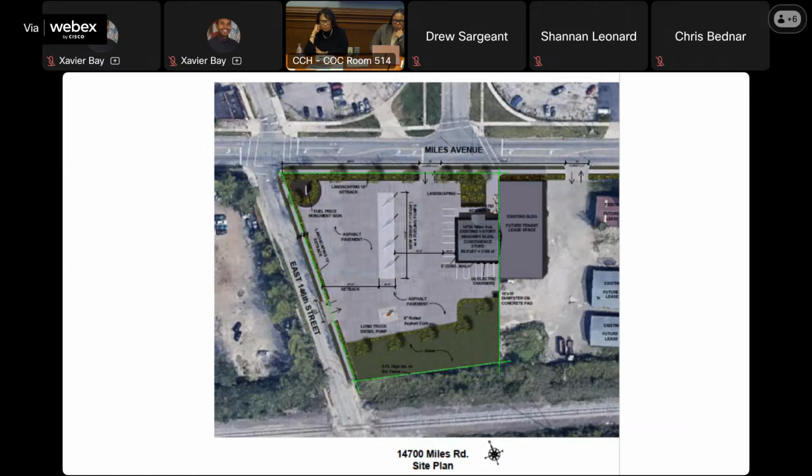Behind the convenience store building, where it's facing the gasoline fueling pumps, there are 4 other buildings that are owned by the owner. That's part of phase 2. The desire is to open up the convenience store gas station facility as phase 1 of this project. Then the other 4 buildings that they own and control, we will develop into commercial space. But we will work with the community. We have no intended use for those first 4 buildings.